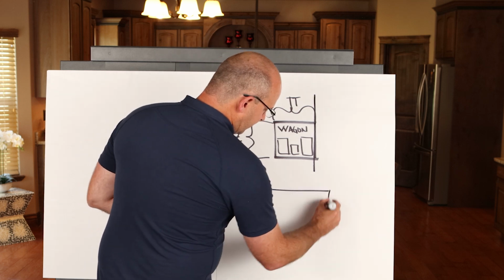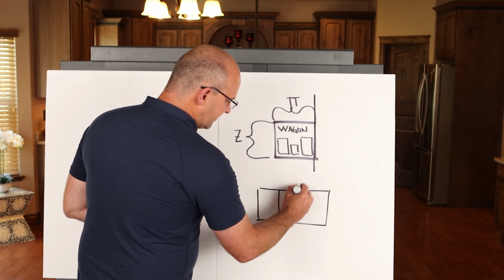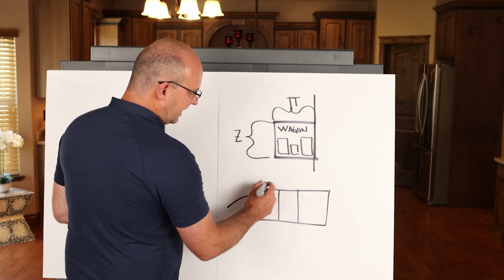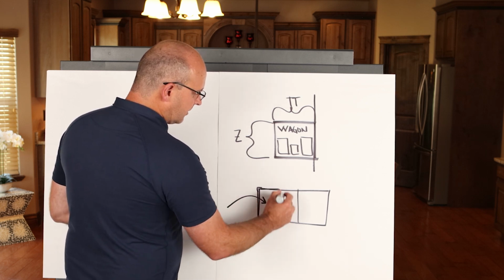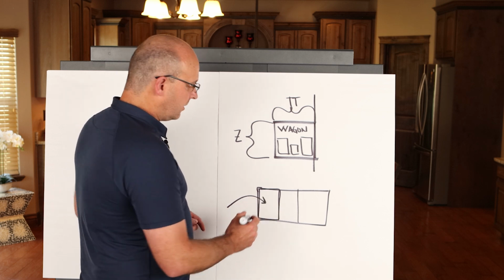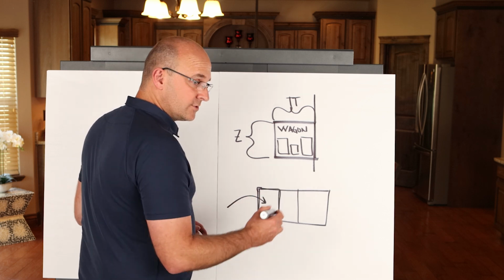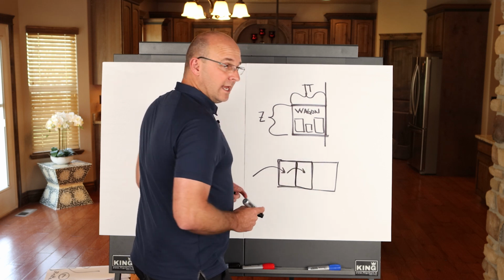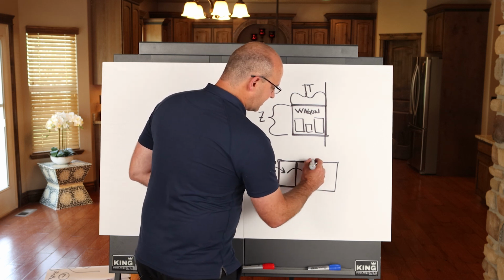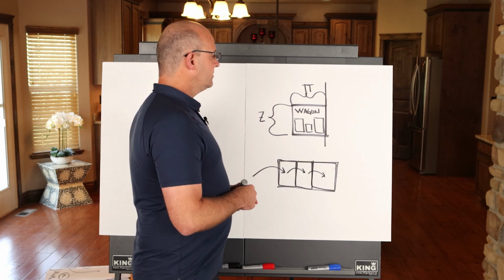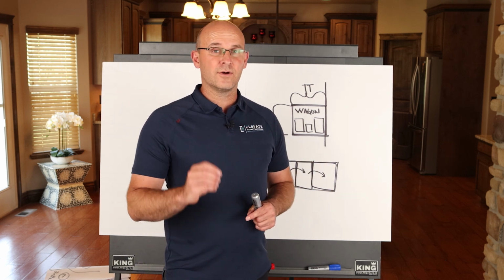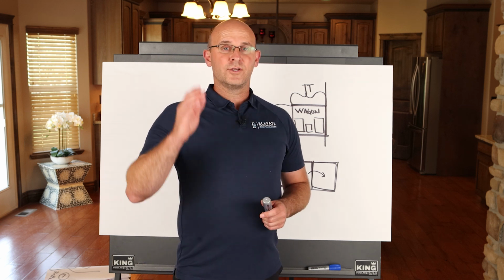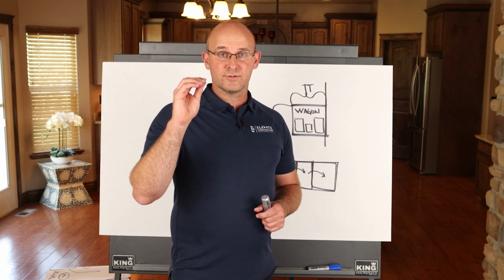So as you're moving through the building and you have these different zones, the trade partner knows, hey, I go into zone 1, my takt time is the parameters along with the zone size that I have to accomplish this work. And I can measure how well I'm flowing. I go into the next zone, this is my takt time, and that's the size of my zone. It gives you an indicator to know if you're flowing and going the right speed, and to really QC and finish the work as you go, so you have parameters where you can see problems real time.